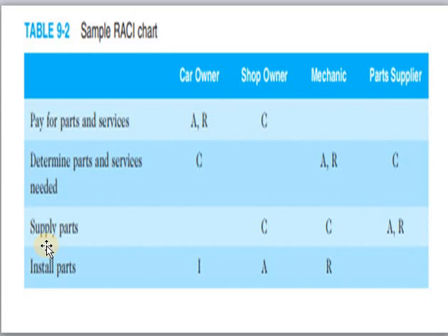The fourth activity, supply parts, for this particular activity, the shop owner is the consultant who has the sufficient information for the guideline, and the mechanic is again a consultant, and the part suppliers are basically accountable and responsible for supplying the right parts.